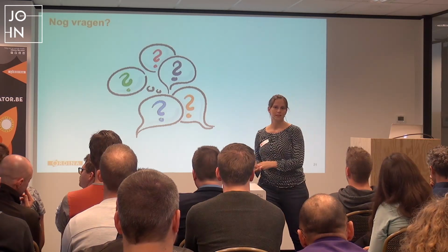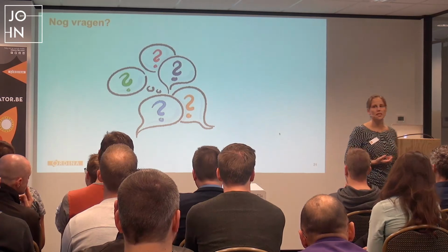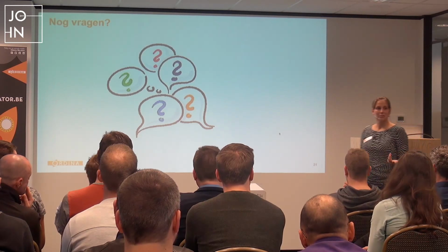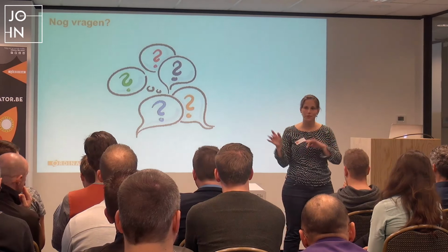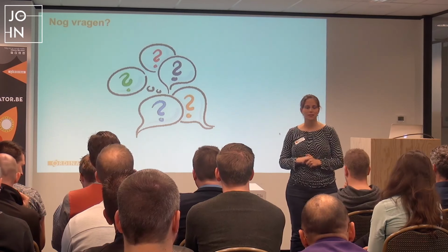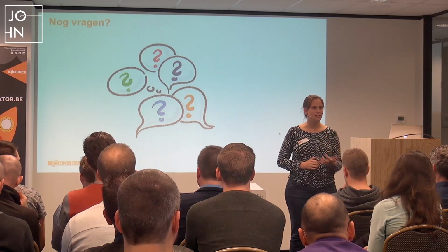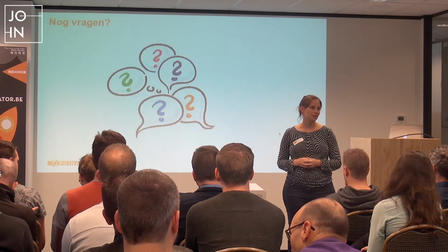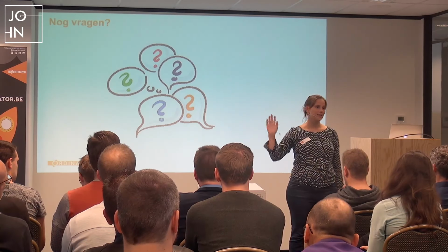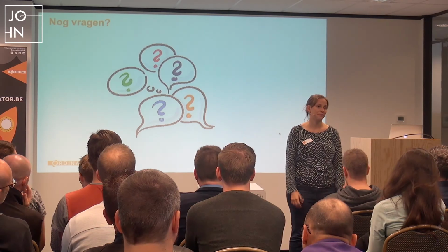And for the output of needing it or what they do with it, you can always find one measurement or another. One common measurement is time. Measure the time a person takes to put a form into an internal system. Sit next to them with a stopwatch, measure the time, multiply it by the number of requests they're processing per week, and say, hey, this is the value we can save if we do this in half the time.